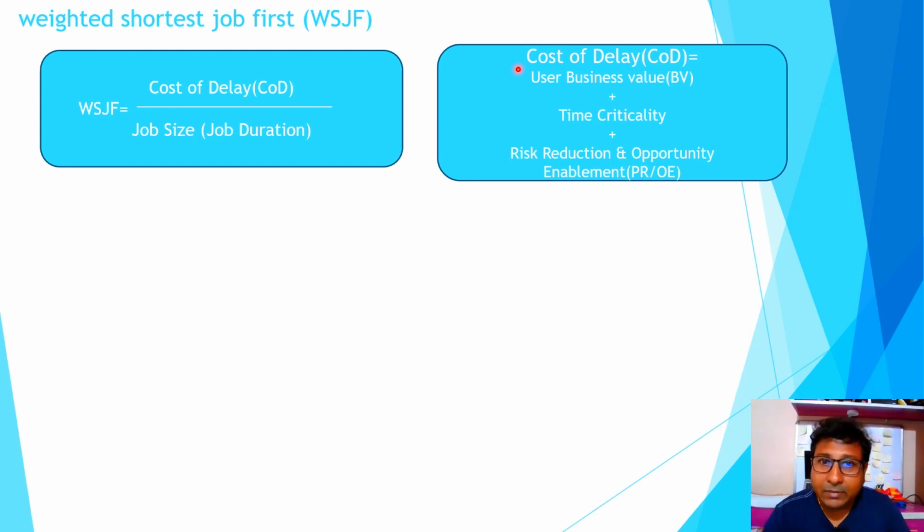There, this particular parameter, that means this business value gets identified, or you give the business value ranking for different requirement pieces, be it a user story, a feature, or an epic, whatever it is. You do the stack ranking based on the business value, and you pick up items based on that stack rank. Whichever has the highest business value, you pick up that item for delivering first.